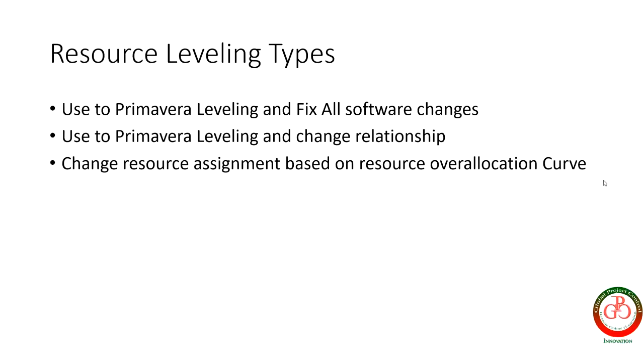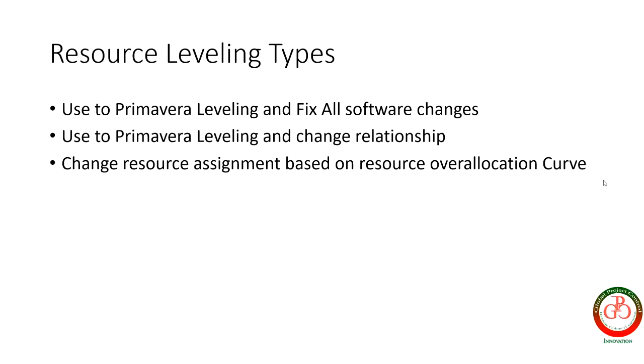But what is the third solution? The third one is change resource assignment based on resource overallocation curve. The two previous solutions are useful when you cannot assign extra resource or you cannot access new resource to your project. The third one is available when you have reach to unlimited resource pool in your project. So you can use another resource and decrease the overallocation.